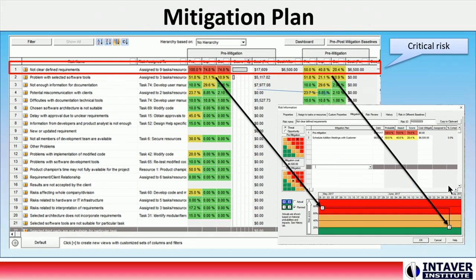Here is the risk register. After running a simulation, risks are automatically prioritized in the risk register. In this example, the most critical risk has an expected cost of $17,809. To minimize the impact of this risk, the team decided to schedule additional meetings with the customer at an expected cost of $6,500.